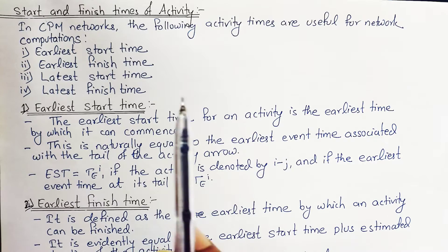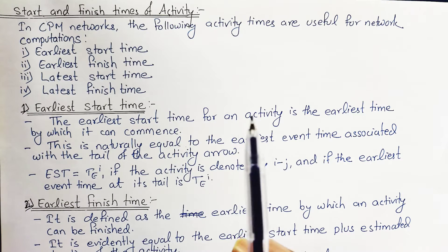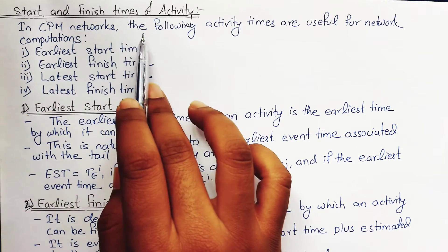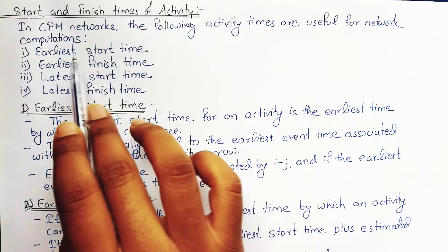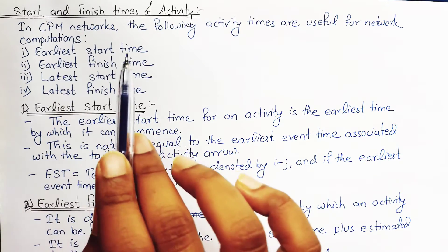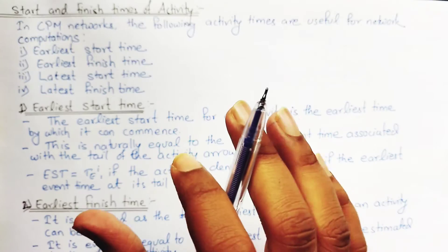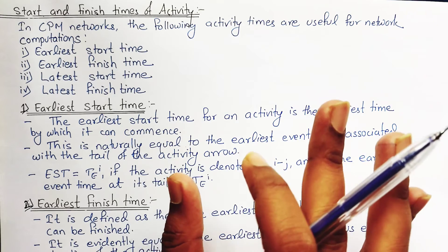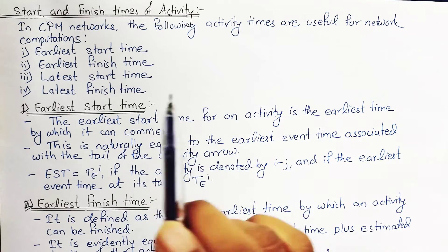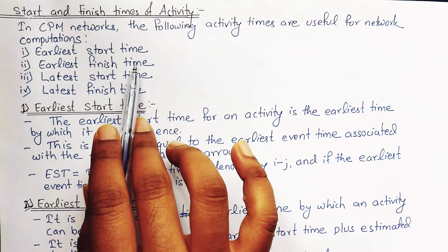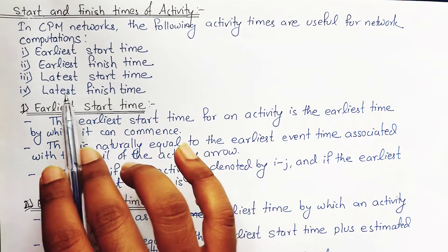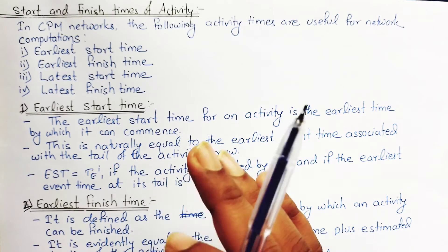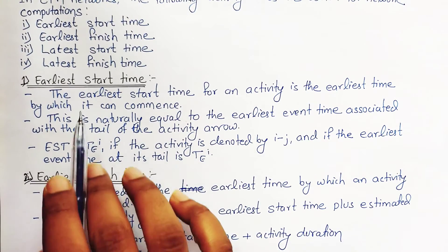One must always know about different start and finish times of activities, which are mainly used in CPM network computation. The four time estimates useful for CPM network computation are: Earliest Start Time (EST), Earliest Finish Time (EFT), Latest Start Time (LST), and Latest Finish Time (LFT). We will now learn about each of these in detail. The first is Earliest Start Time.